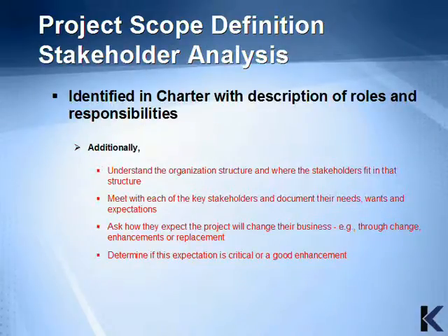In this case, stakeholder analysis is where you're identifying the stakeholders' expectations, needs, and desires. From this, you derive the detail of the project goals and deliverables. It's assumed that you've brought the stakeholders in during the project charter or preliminary scope statement creation. But this analysis is a revisit to the information you've accumulated about the stakeholders and what they want. You want to bring that information into additional detail in this next deliverable. Remember the term progressive elaboration? This is a good example of it.